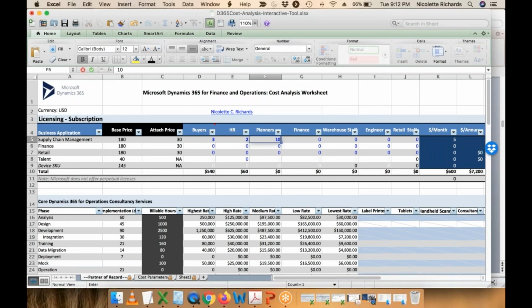Okay, so monthly you've got a cost of $9,010 MSRP. Annually, that number is going to be about $108,000, and then over a 5-year window, right? 5 years of use for all your users at MSRP price, you can project what those costs are.